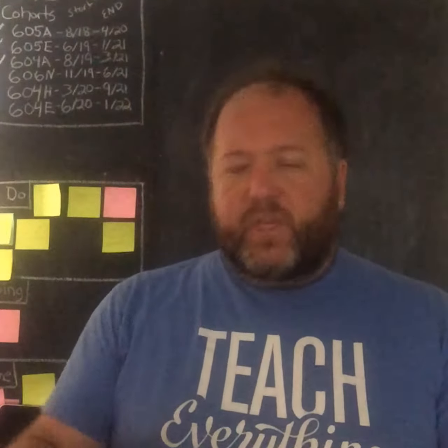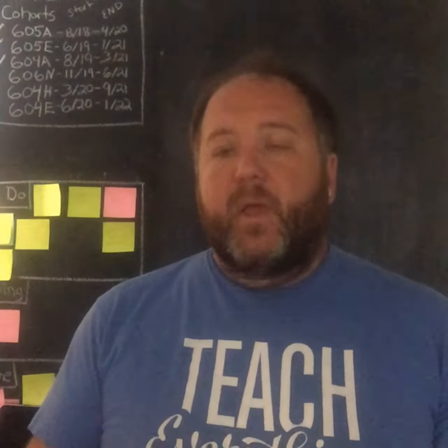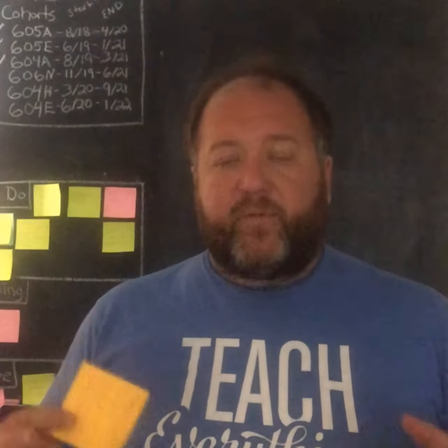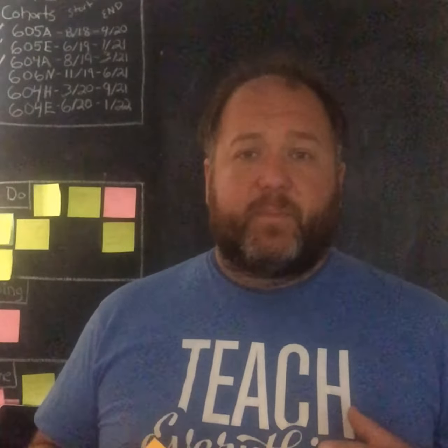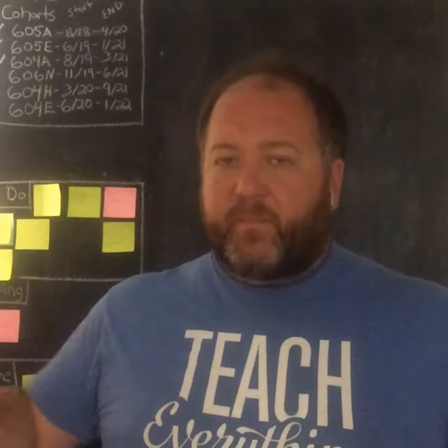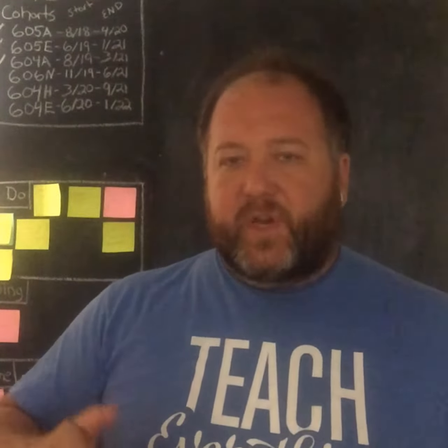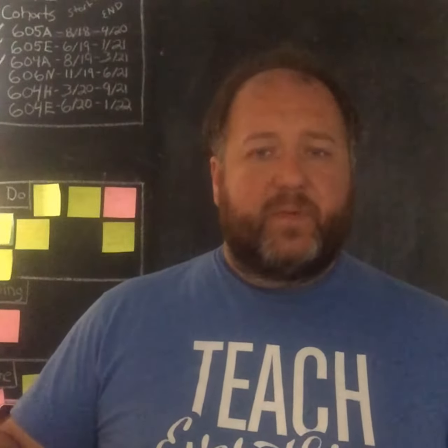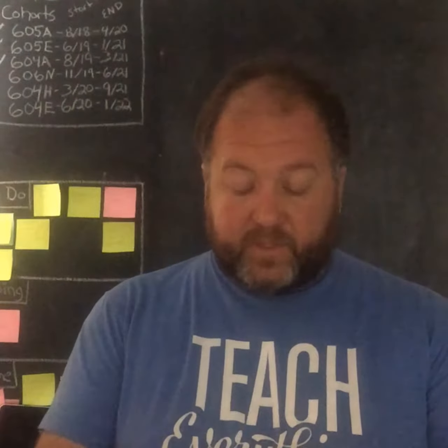And then you'll need to make sure that you have a change management procedure in place, something formal, because not having a change management procedure formalized is where you end up with the horrible, horrible concept of scope creep. So when you described the scope of the project and you put those boundaries out, you drew those lines in the sand, all of a sudden people start asking for more. And if you don't make them document their requests and have those approved, you end up really, really shooting yourself in the foot. It's not a pleasant experience.